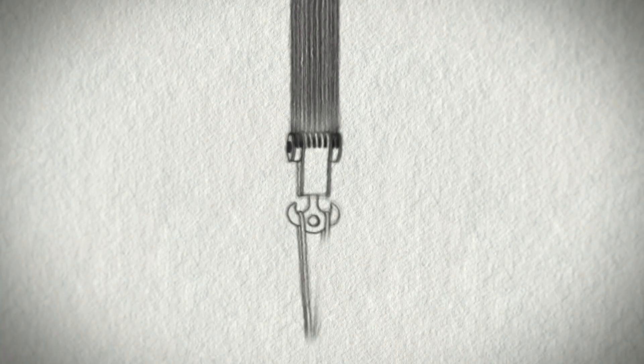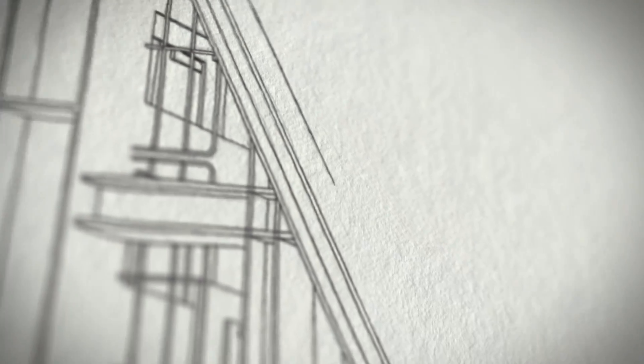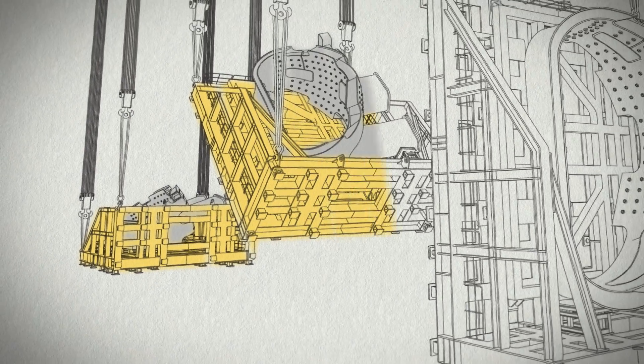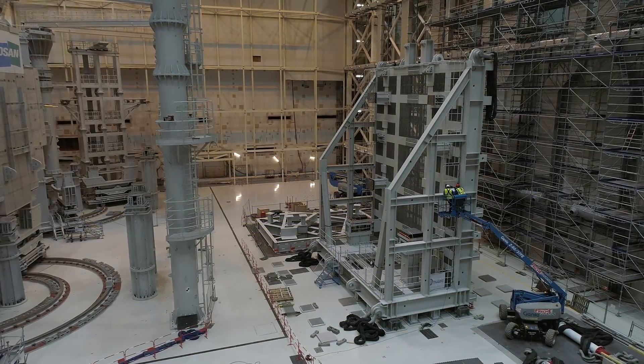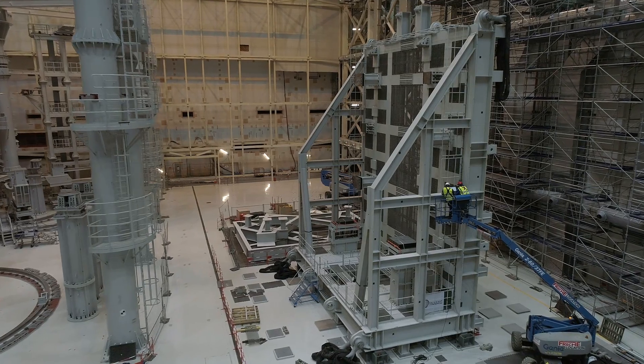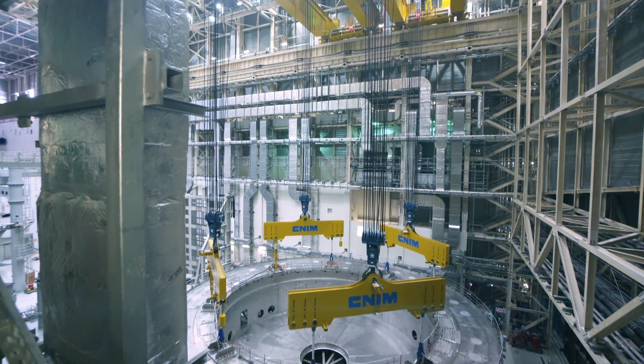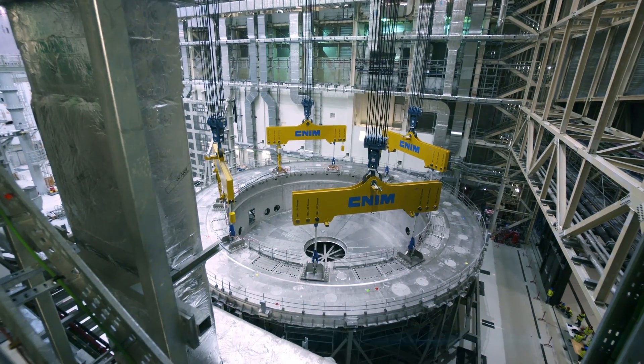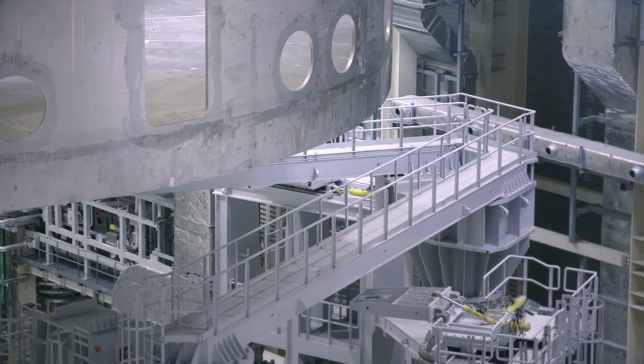In all, dozens of custom tools will be required to assemble, lift and finally manoeuvre ITER's supersized components. The tools will have a range of lift capacities, 500 tonnes for the up-ending tool that will turn vacuum vessel components from horizontal to vertical, and 1,500 tonnes for the heavy lift cranes that will carry all major tokamak components into the tokamak pit for assembly and welding.